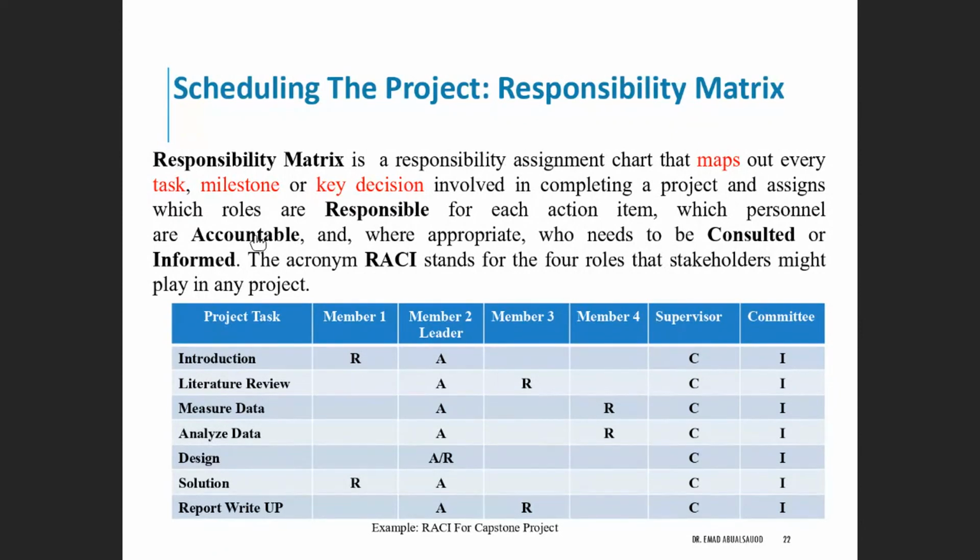He or she must sign off or approve when the task, objective, or decision is complete. This person must make sure the responsibilities are assigned in the matrix for all the related activities, and success requires that there is only one person accountable, which means he will be the one responsible for the completion